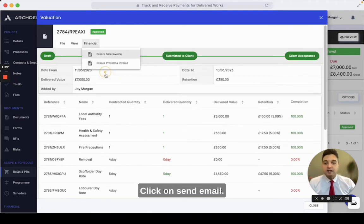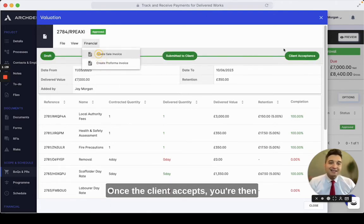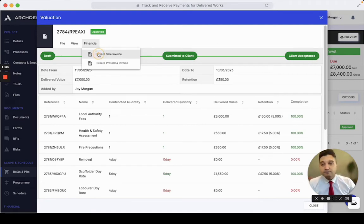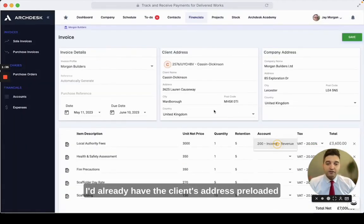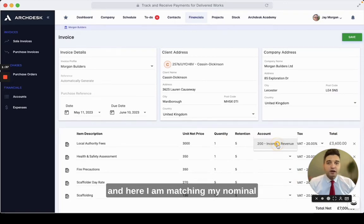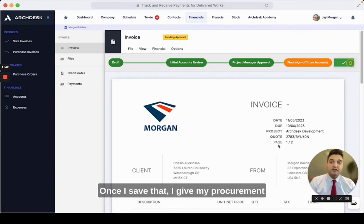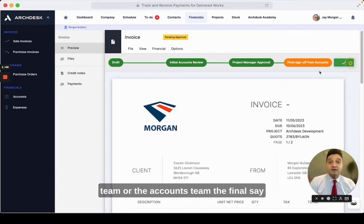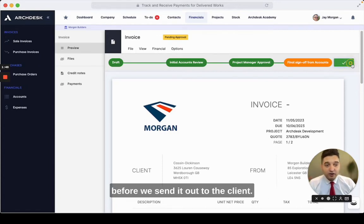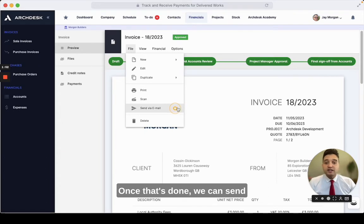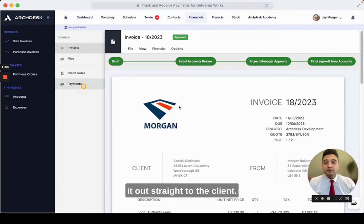Click on send email. Once the client accepts, you're then ready to create your sales invoice. I've already had the client's address pre-loaded, and here I am matching my nominal codes with my accounting software. Once I save that, I give my procurement team or the accounts team the final say before we send it out to the client.